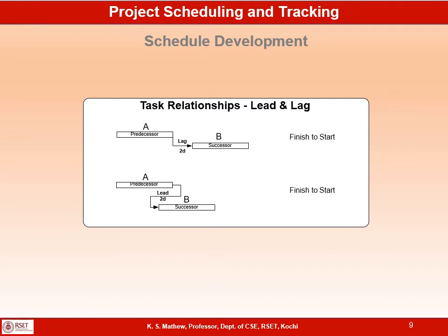So there is a finish to start relationship, but the second activity can be started only after a delay of 2 days or 7 days or 10 days, in the case of a construction project. That is called lag. Similarly, there could be a lead also.